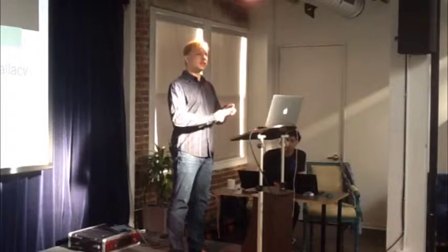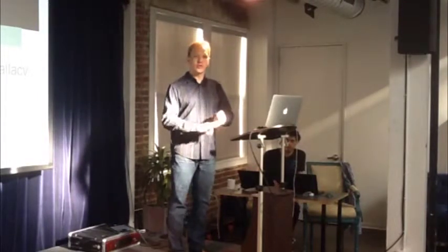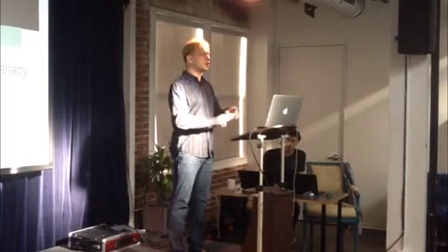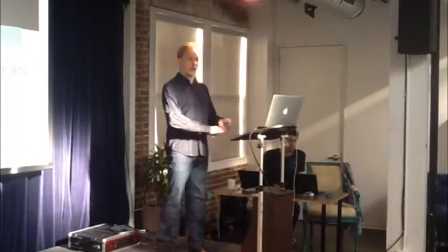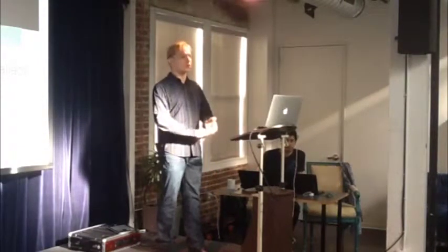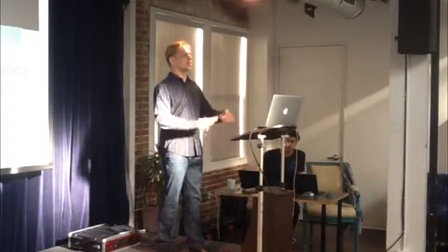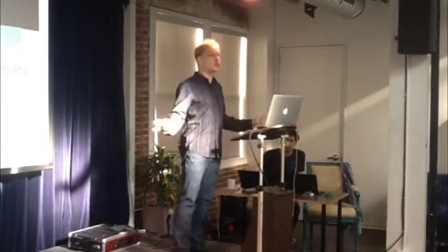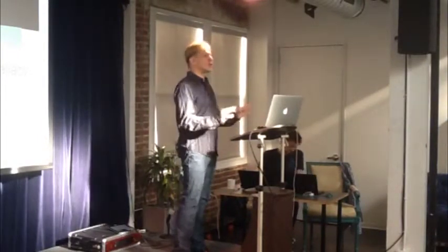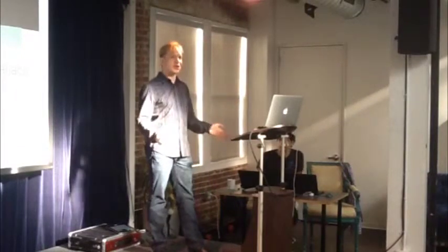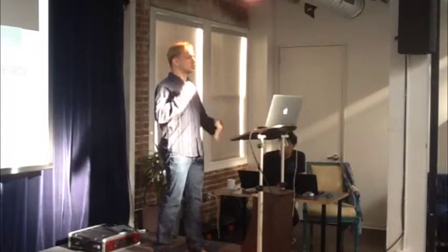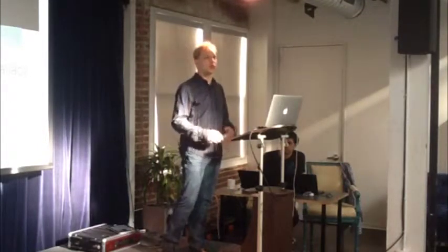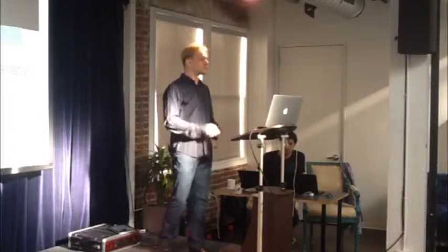Even having done a task before and having observed that they underestimated, they still underestimate it the next time. And even having done that and knowing about the planning fallacy and trying to take that into account by padding the estimates, they still underestimate. This is a universal problem for all people. The psychological research about it is pretty much a slam dunk. So we can't just trick ourselves into making an estimate accurate. We have to use tools to solve this problem.